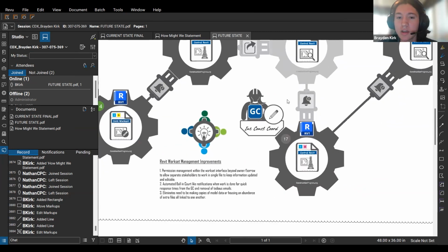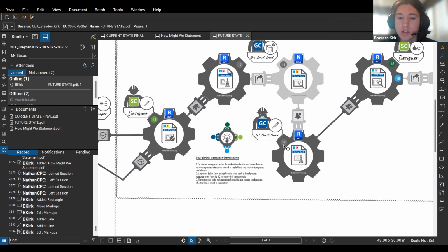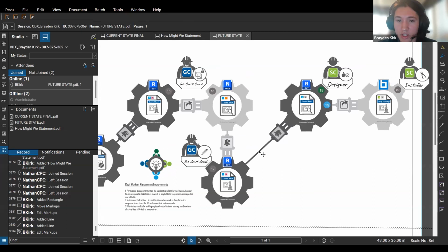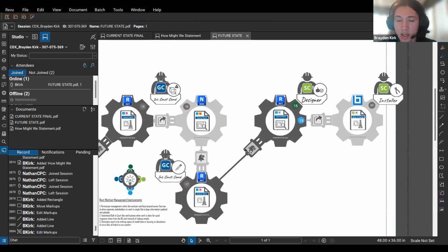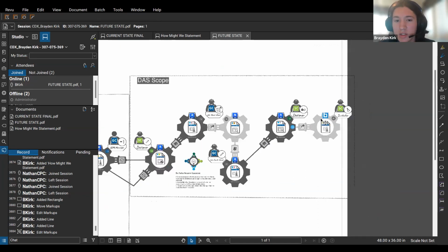That can be notified to the integrated construction coordinator again to make the suggested changes. But those changes no longer need to be referenced back and changed within the linked file by Henderson, because it is all within the same file ecosystem within Revit. Then that notification can once again be sent automatically to the designer to approve, and then export to the shop drawings for install.